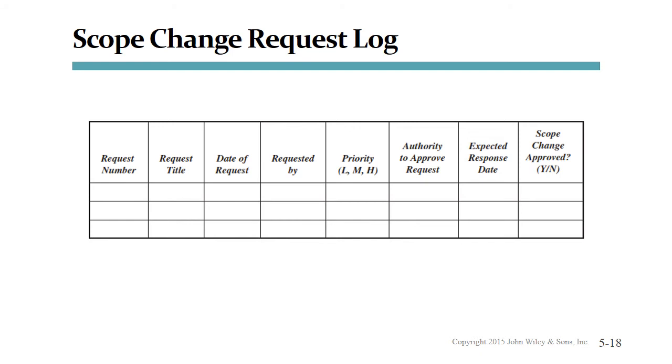That's very, very important because remember, any change request is a modification not just to project scope as stated in the project charter, but it is also a modification of the project budget. And more often than not, a scope change request also will extend your project schedule.